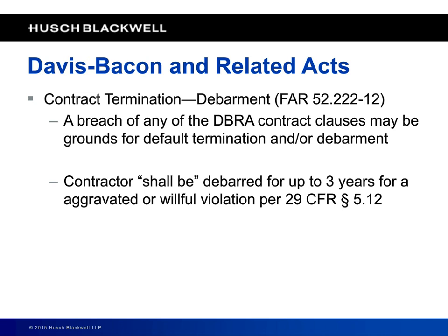And in turn, FaceTech did not pay its laborers, its electricians used on the project, in accordance with the Davis-Bacon Act. So there was a key tam lawsuit, and it was found that Circle C had violated the Davis-Bacon Act by not flowing down the requirement and not ensuring that the sub's employees were properly paid.